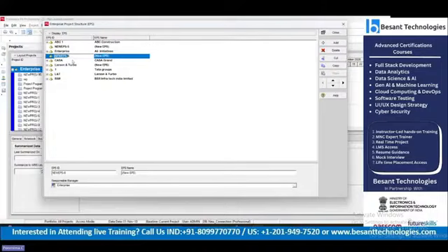So I'm renaming it. You can even double click and rename it here, or else if you go to the detail window, you can see this. Here you can rename your EPS name and your EPS ID. In Primavera P6, no ID should be repetitive; all IDs should be unique. So if it is repeating, it is not going to accept.